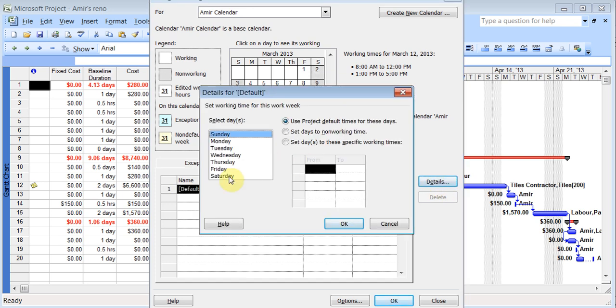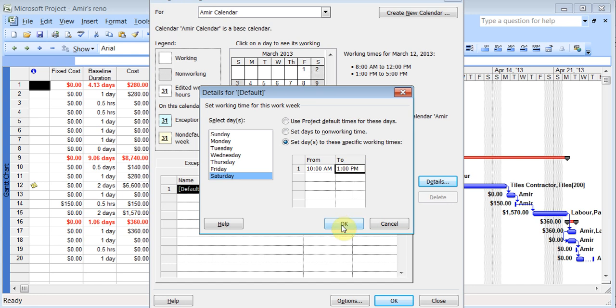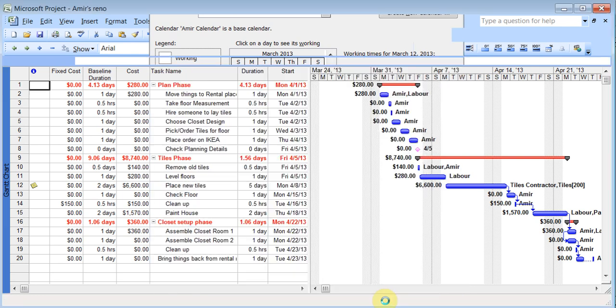And I can set the Saturday time for it and set some hours. So I'll say on Saturday 10 a.m. to 1 p.m. I'll be working. I can click OK. And I click OK.